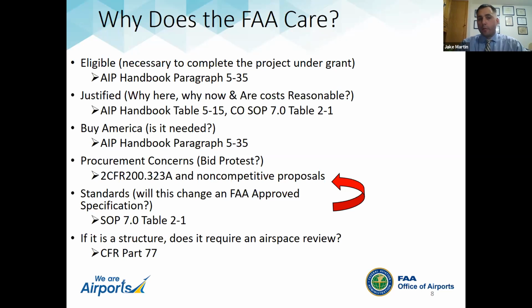If you're right at the type 3 waiver requirement of 60%, that would be a big concern. If you're somewhere in the 80s or 90s, depending on the size of that change, it might not be that big of a deal, but we definitely want to take a look at that.